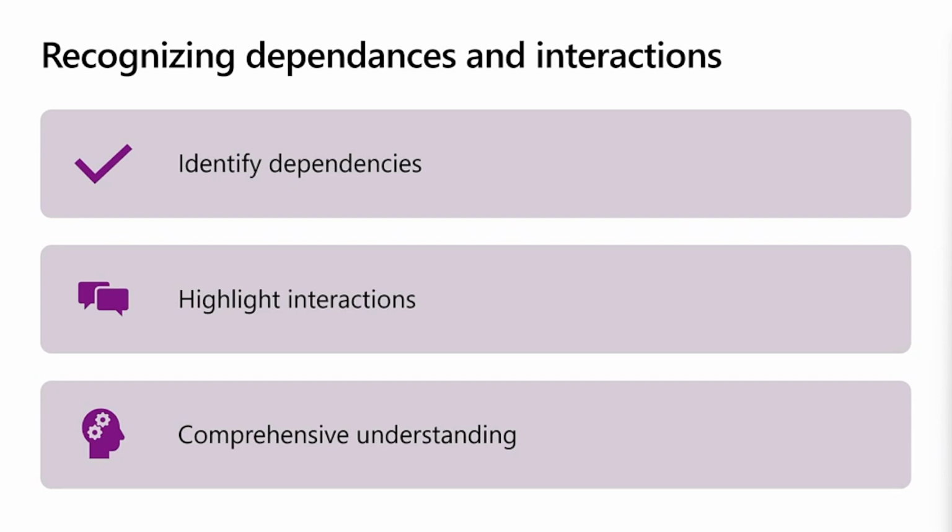And in this process of identifying dependencies, it's not just dependencies within Dynamics 365. It's important to think about dependencies that are going on outside of your business. So if you have other projects that are happening that the Dynamics 365 project is going to be dependent on, you need to identify that. This is also like that first clue or cue that maybe we need integrations between other systems.